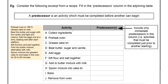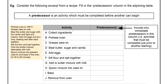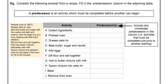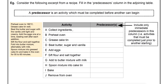The first example I've got is an excerpt from a recipe — maybe a cake or something like that. What we're going to do is look at predecessors: what activities have to be done before another can begin. It is possible in a project — in this case, making this recipe — to have activities that don't have predecessors. Hopefully by looking at it in practical terms, in terms of a recipe, it will make more sense.